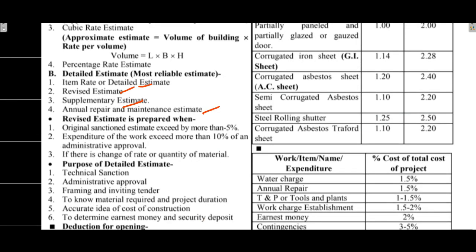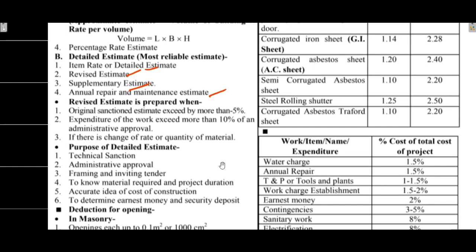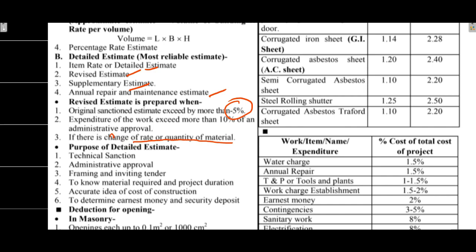From exam perspective, the revised estimate is important. Revised estimate is prepared when the original sanction estimate amount exceeds by more than 5%, or when expenditure of the work exceeds more than 10% of administrative approval, or if there is a change of rate or quantity of the material. The administrative approval 10% and original sanction estimate exceed by more than 5% are very important.